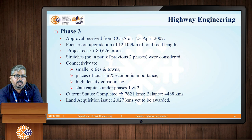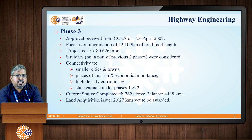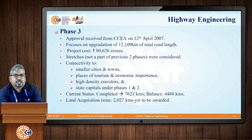Moving on to Phase 3, an approval was required, and for this purpose, the Cabinet Committee of Economic Affairs provided approval on 12th April 2007. The main aim was to upgrade a total road length of 12,109 kilometers, with an estimated project cost of rupees 80,626 crores. The stretches considered in this phase did not include any from the previous two phases. The main focus was on connectivity to smaller cities and towns, places of tourism and economic importance, high-density corridors, and state capitals that were part of Phase 1 and Phase 2.